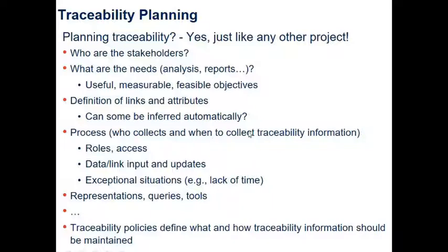Process, who collects and when to collect traceability information. How often should you be collecting this traceability information? The roles and who has access, data and link input and updates. Exceptional situations, for example, if you have lack of time, if you don't have enough time to do all this traceability and record all this data, what do you do then? Do you have a backup plan, right? Representations, queries, tools. So traceability policies define what and how traceability information should be maintained.